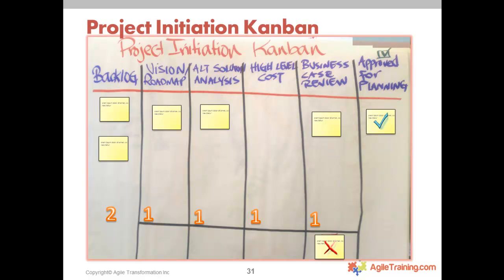Every single idea that gets qualified and approved, you can't just approve it for execution, and then what happens is the project manager goes and tries to allocate resources immediately. Well, that's what we call the push method. The push method is where the resources are already working on other projects, and now you're asking for 20% of their time, 30% of their time, 50% of their time to try to get this project done.